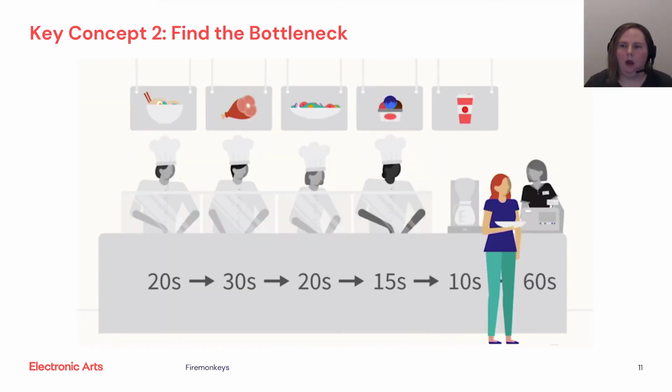For example, on my very first game project when I was the producer, I identified a project bottleneck during scheduling. Laying the timeline out, I noticed that our animator could only produce 1 to 3 animations per day, and our game required well over 130 animations to be produced in 3 months. After the animations were complete, we still needed time to implement them.